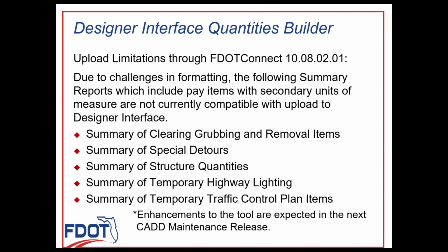Unfortunately, at this time, the following summary tables will cause errors if you include them in the XML to upload to Designer Interface: the summary of clearing, grubbing, and removal items, the summary of special detours, summary of structure quantities, summary of temporary highway lighting, and the summary of temporary traffic control plan items.